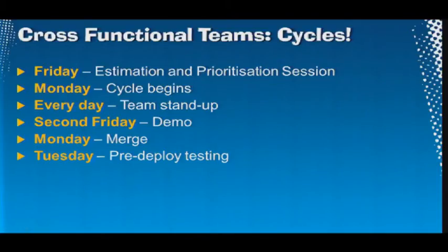This is when we might do our load testing that I said we didn't do. Then on Wednesday morning, we deploy. Fingers crossed, hopefully. It goes out on the Wednesday morning. Sometimes it might slip. If it's going to slip, we pretty much slip it to Thursday. We don't push out on a Wednesday afternoon.